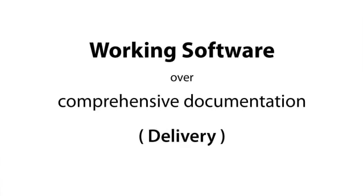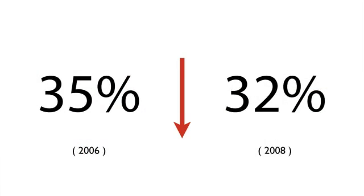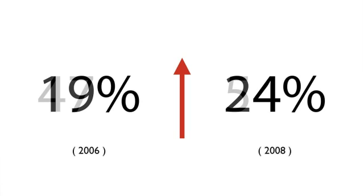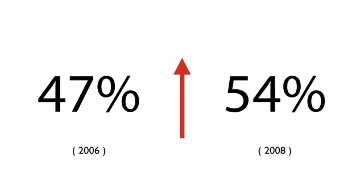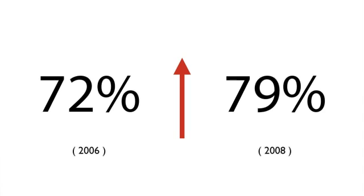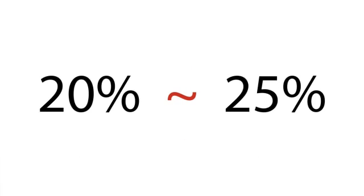The second value we're going to look at is delivery, which is written in the manifesto as working software over comprehensive documentation. This comes down to two big points: building the right thing and focusing on quality. The Standish Group every year releases a report called the Chaos Report — the latest one was in 2009 and looks at projects between 2006 and 2008. Project success dropped 3% down to 32%, project failure rates went up by 5%, cost overruns went from 47% to 54%, time overruns were up 7% to hit 79%, and feature use is holding steady at between 20 and 25%. So a lot of projects aren't doing well, and a majority of features being developed aren't even being used.